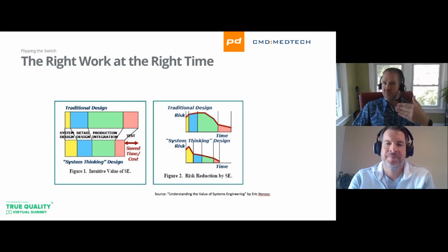It's expensive because you put in a lot of work, and you put in a lot of work under a formal quality system that you might have to go back and change if you didn't discover these risks early on. So an extreme example, you may have developed some pre-production units for, let's say, a cardiac ablation device. And then you find out during your summative evaluation that, oh gosh, we thought doctors were the primary users of this device, but it actually turns out that the OR nurses are the primary users of the device.